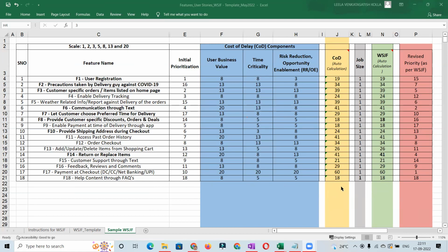No, so if you only have business value, then see, there is no one size fits all, right? So let's say you have business value, but you have to cater for other aspects as well. Dependencies is another aspect which you have to cater for. You have to look at technical readiness as well. So something might be important, but your team is in the process of hiring that particular resource with that particular skill set, right? So you cannot say start at day one, because the resource itself is not there to do that. So you have to decide based on what the current position is.